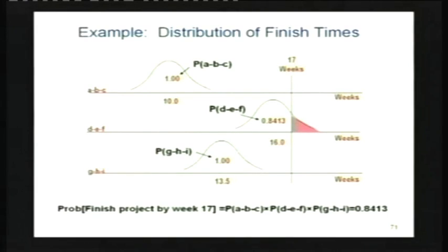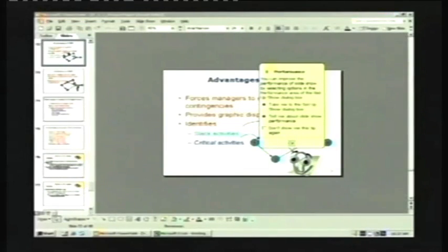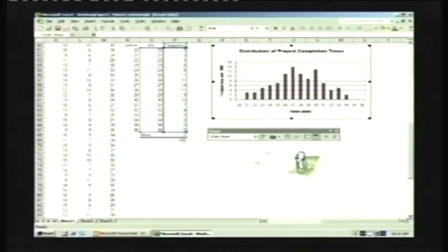Here again, I can say this is the path that is very likely going to affect my project. So what I do is I swing resources. I try to see if I could bring them back here. So this is in fact what is done. I've converted this into an Excel worksheet, and I'm going to be mailing you that worksheet. You'll actually be seeing this Monte Carlo. The Monte Carlo will eventually end up giving you a distribution like this.